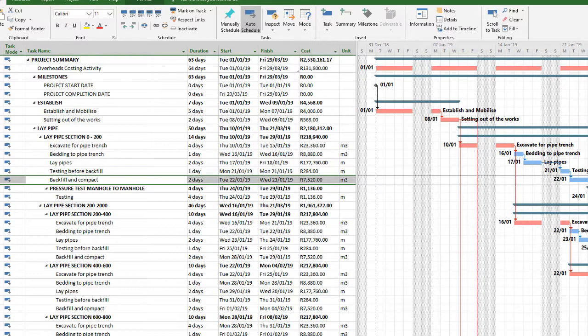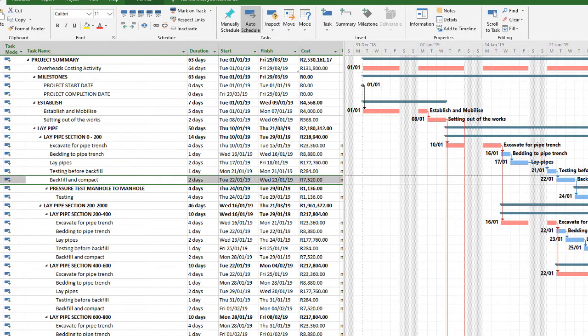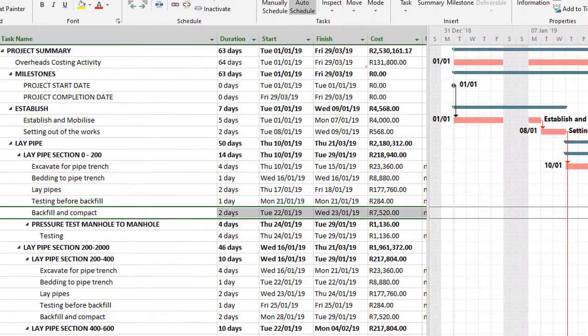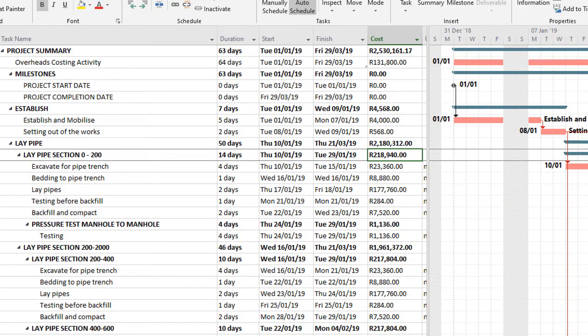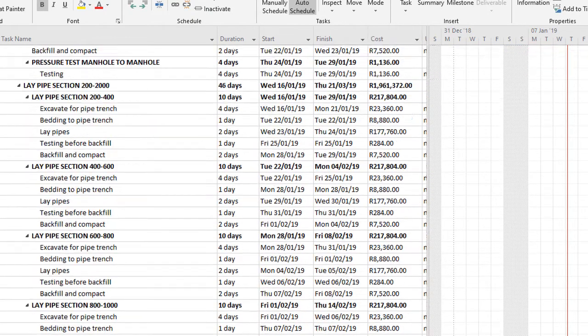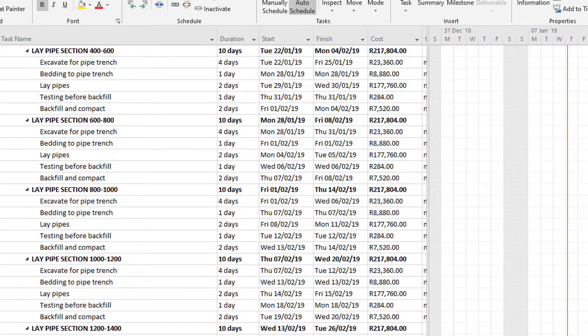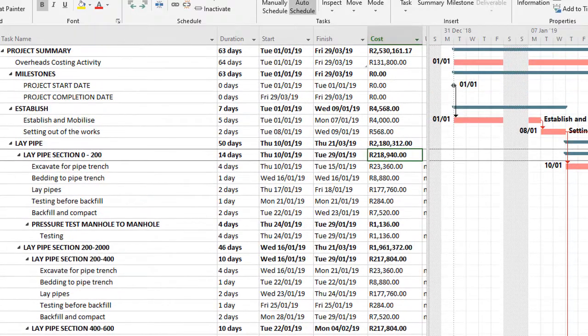Now, if you open up the cost column or the cost field in MS Project, you'll see that's how I compile the cost for this section of pipe. And as I copy and paste that and do the loading of the other items, it all tallies up to a big total there on top.